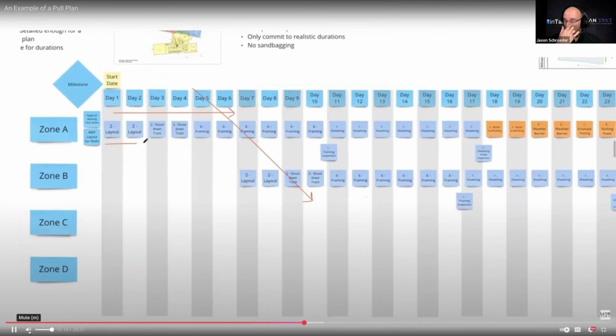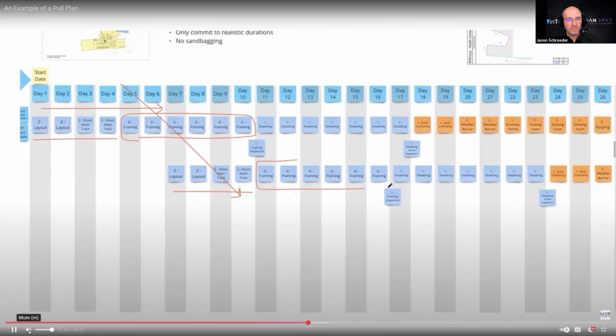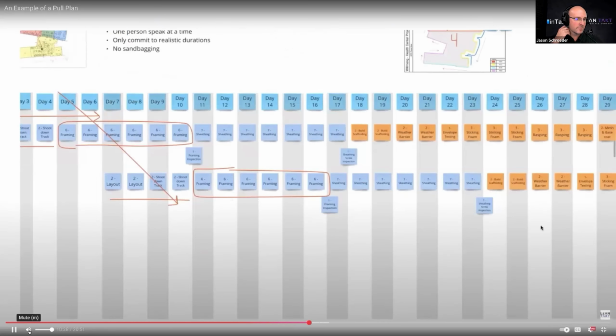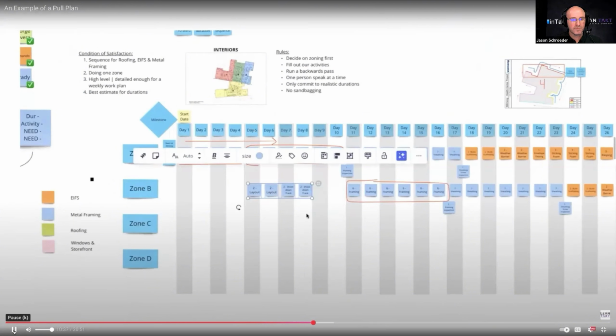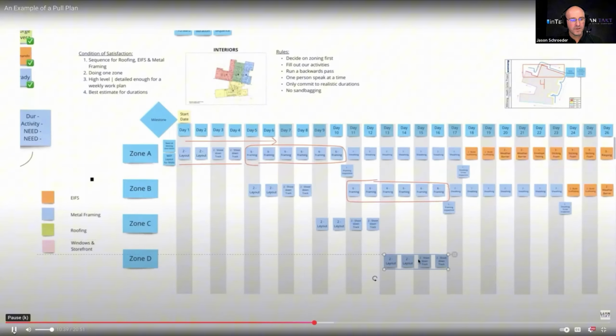So the layout and then shoot down track, that is on like a 4-day stagger, but it looks like the framing here is on a 6-day. So a 6-day. Essentially, when I'm done with the first 4 days, I could move to the next area. I see where you're going. Yes, let me show you what you could do. Like if you're the first one out of the gate, your layout and your track crew or...